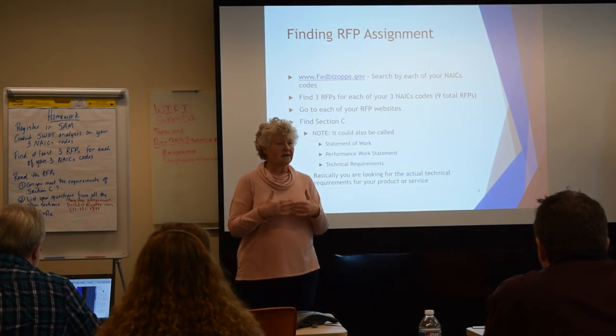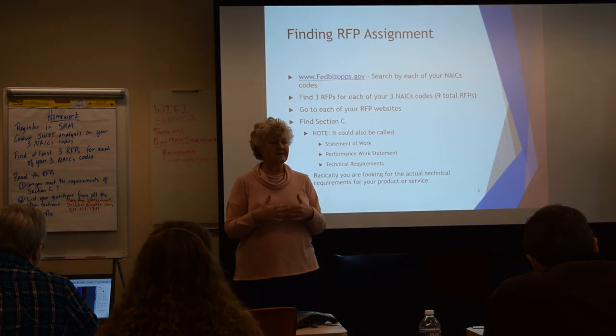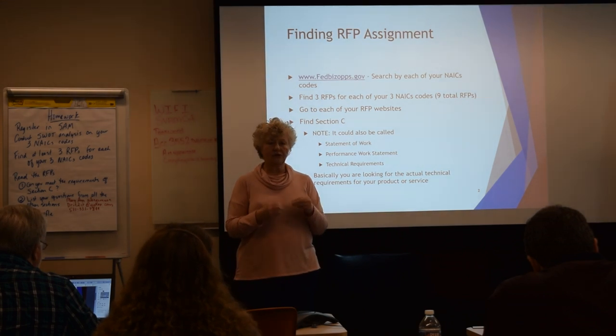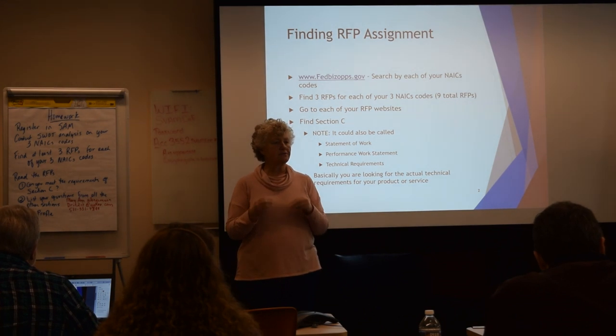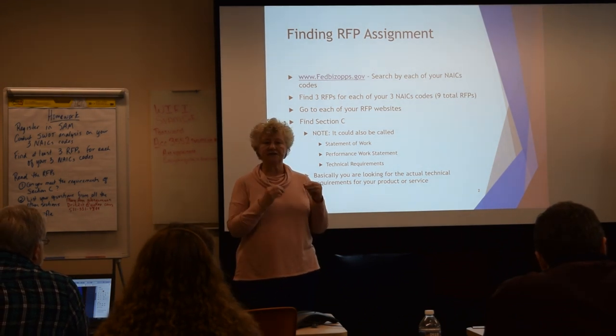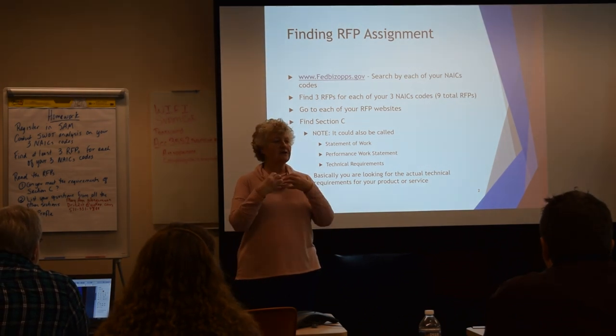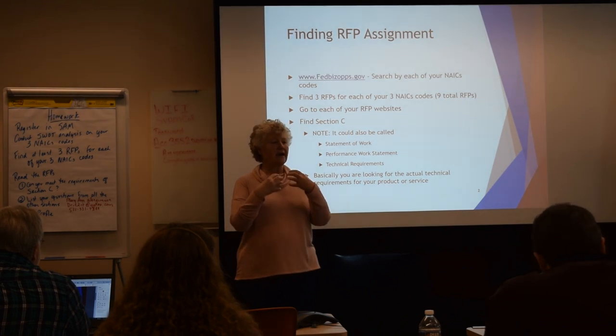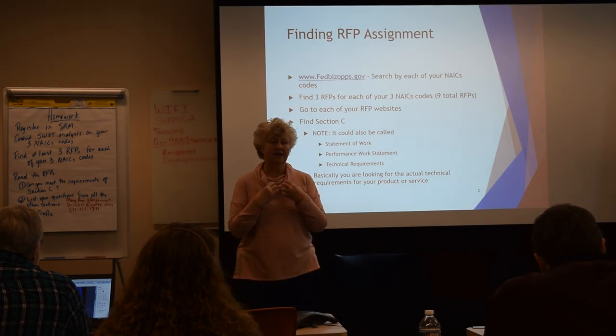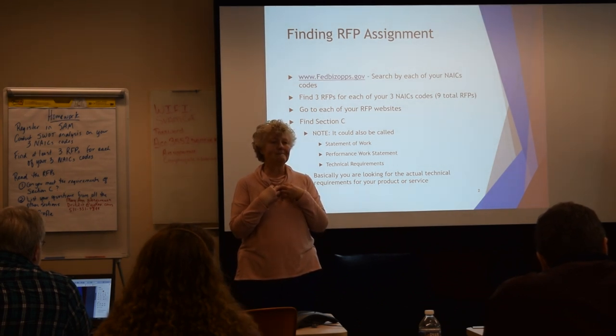there is a tenet of contract law that says whoever drafts the contract, if there are any errors or omissions, it's the fault of the drafter. So if I write the contract and I make a mistake in the contract, it's my fault. Everybody with me? This is important.